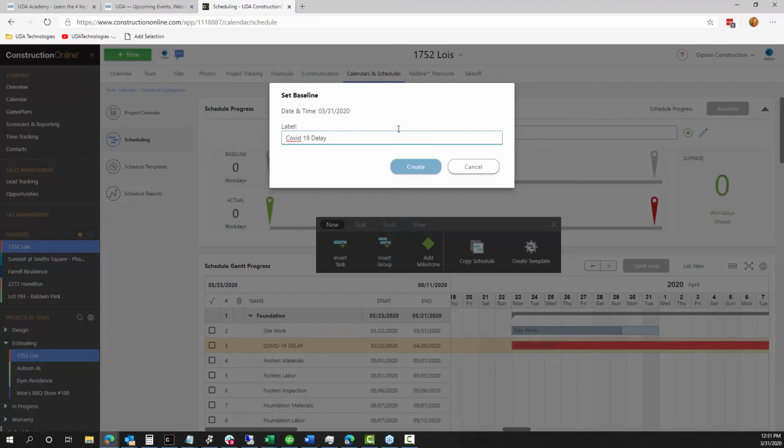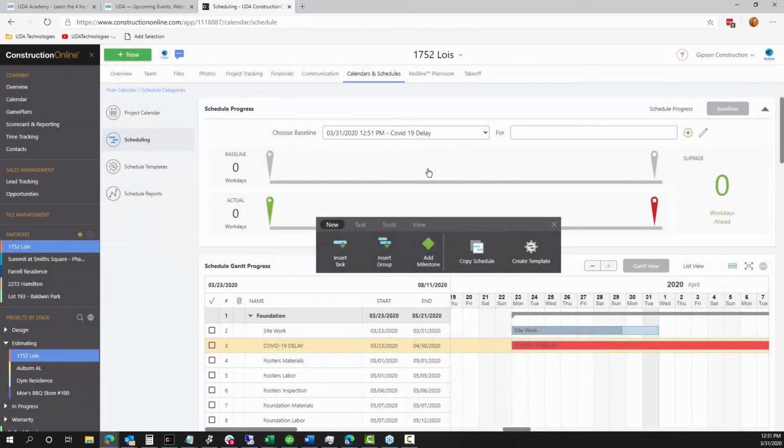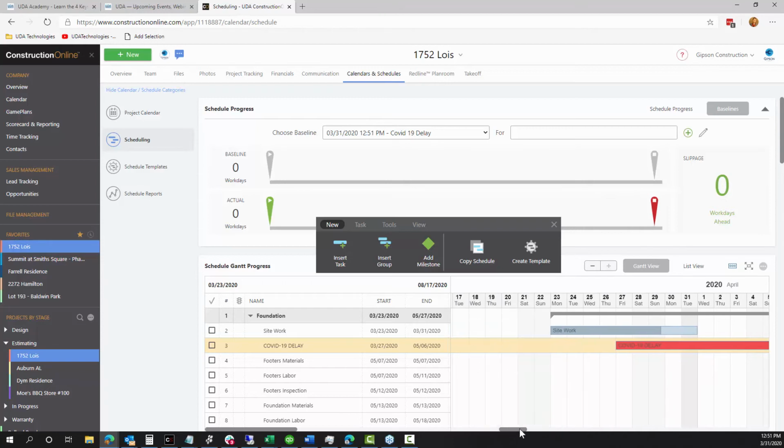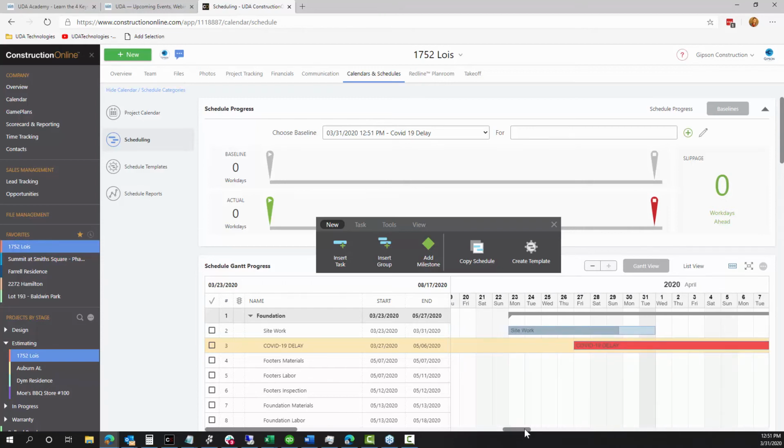Now, the last time we were talking about baselines in schedules, we were in hurricane season. That's right. And a couple of our clients actually had been impacted by hurricanes that year. And we'd actually recommended creating a pre-hurricane baseline and a post-hurricane baseline to keep track of things like, well, here's where we thought we were going to be instead of our baseline, and well, now we're actually delayed by 4 or 5 different days.